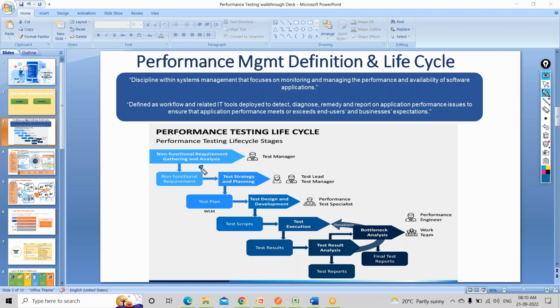Okay fine, by this date the test stage should be completed, by this time I have to get it pressed, like that. But in the test plan, it's each and every minuscule step, even small tests. If I talk in terms of performance testing, your environmental readiness is not under the performance testing purview. I cannot create an environment. So the DevOps team has to give you the environment. That environment readiness is a dependency from the other team, so those things also need to be documented and tracked properly.